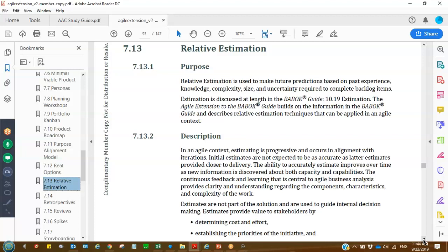They do some padding. And then you have the other side where they think they know how much it should take, even though they don't know the actual work that needs to be done. And so it's been a source of contention for me as a BA, and especially since I've been at the very early stages of the bid process, the RFPs, and seeing how no matter what you provide, even though it is honestly realistic, is slashed, as I said before, for the purposes of winning the bid.